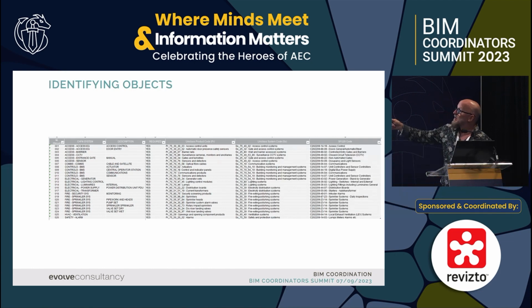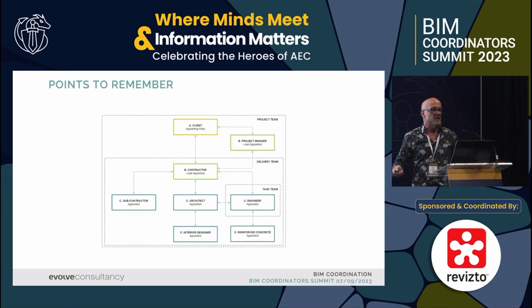What we need to make sure is we give that to them unequivocally. I can't say that on a presentation. Without doubt, they need to know which ones to use. So we'll tell them. Then what we can do is just set up the checking mechanisms and the mapping at the end, which we deal with them for. We don't care about the design team. Give us your models, give us an IFC. We will then handle the mapping from those elements across to the FM system. That's our job, not yours. You're employed to deliver and design. We're employed to do the handover and the FM side of things. So that's what we do.